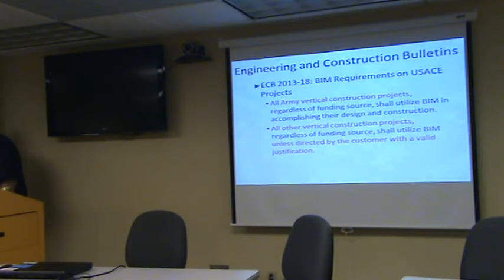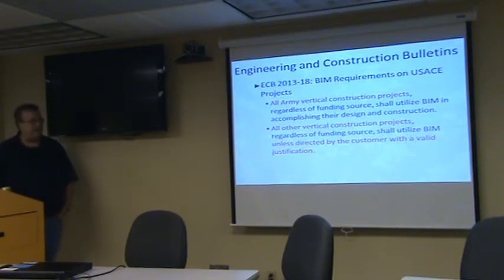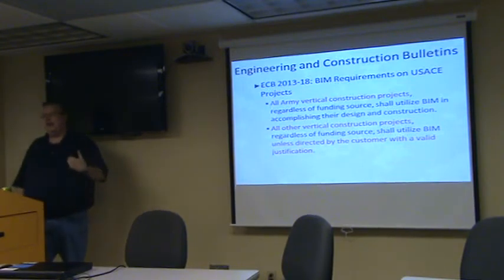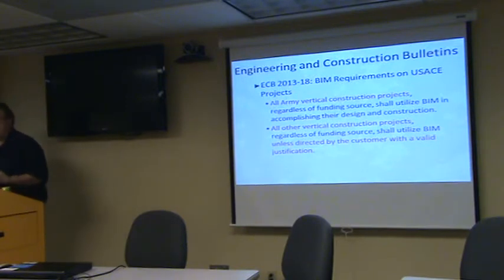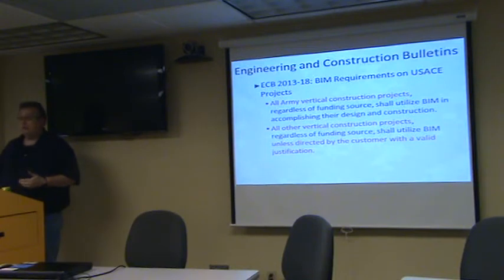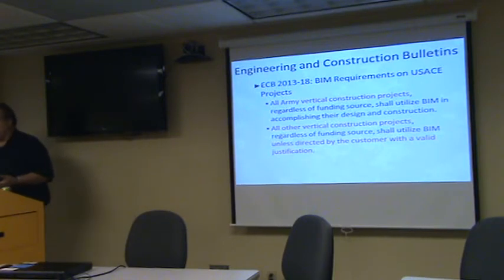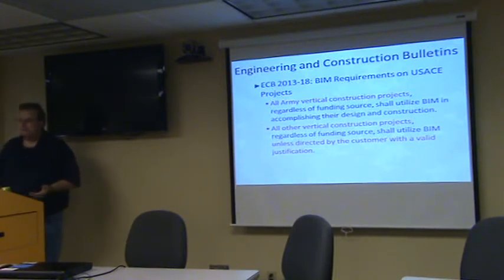All other vertical construction projects shall use BIM unless directed by the customer. So what they're saying is, if the Corps is acting on behalf of the Navy, and the Navy says, hey, we don't want BIM and here's the reason why, and they get it approved, then you don't have to follow a BIM process. Otherwise, if you're working for the Corps and doing some kind of BIM with it, then this is the way it is.